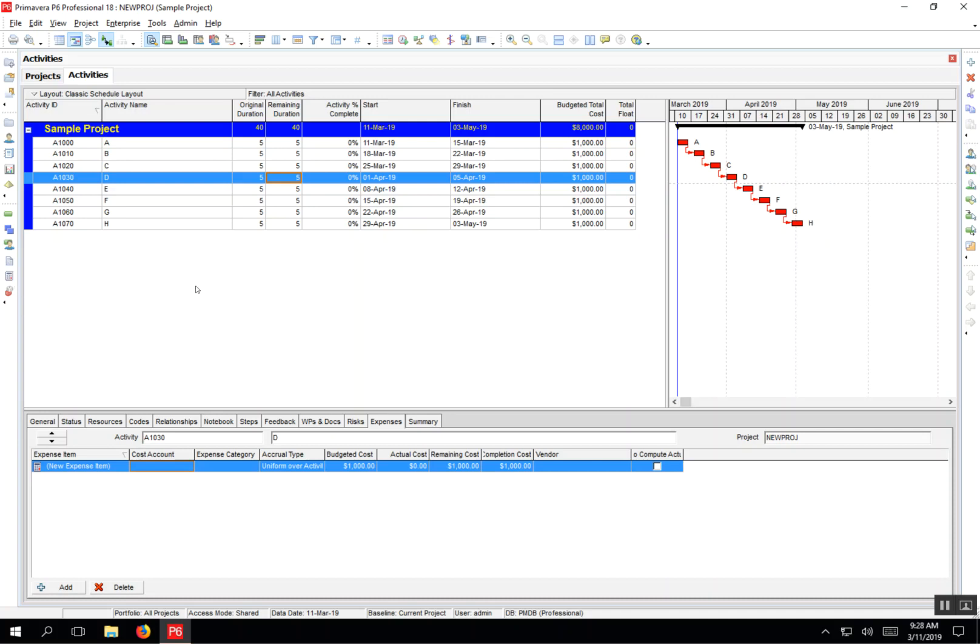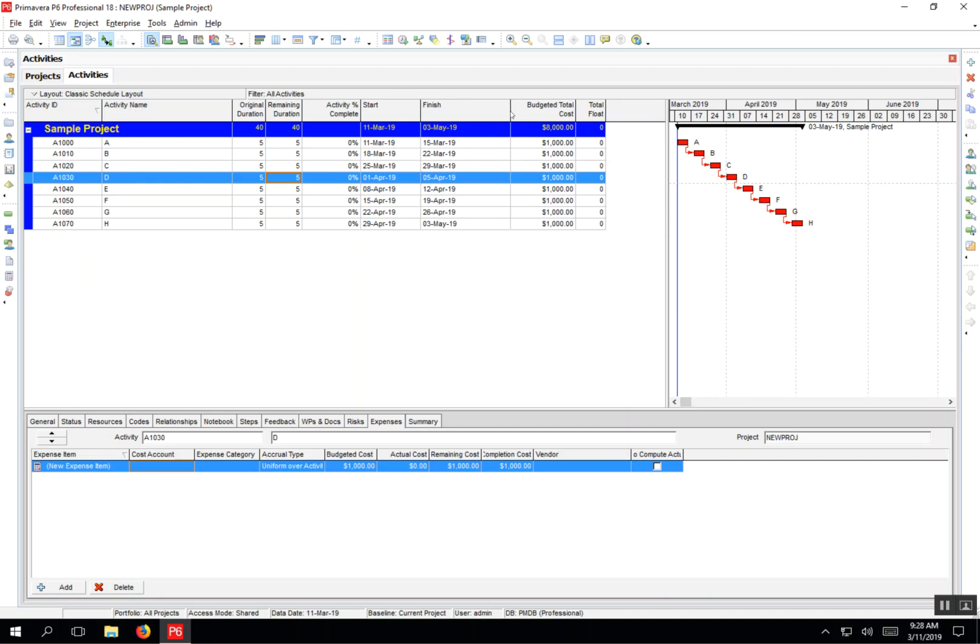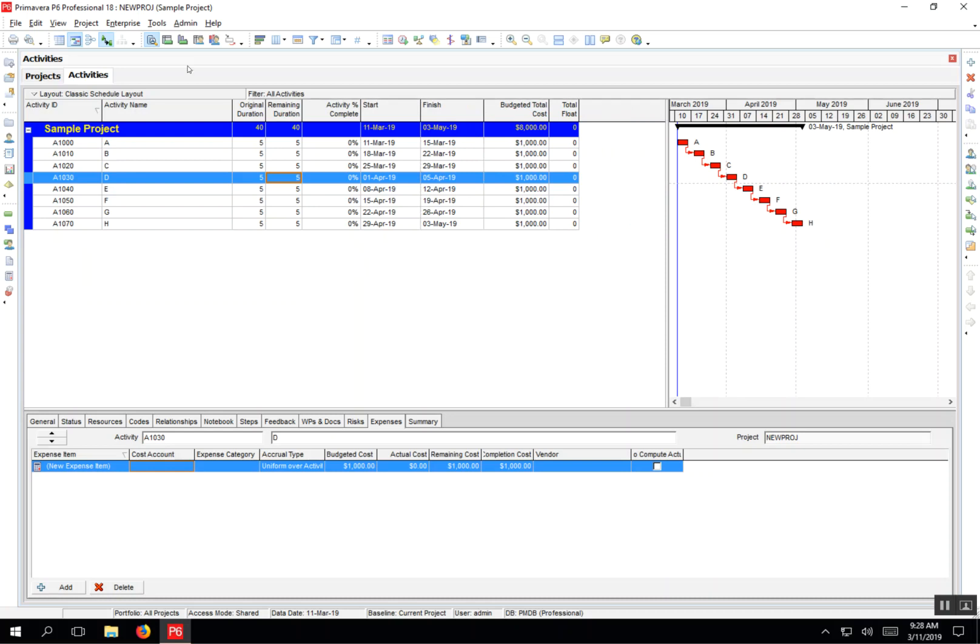We're going to use user-defined fields in a global change to add a 10% contingency to all these activities. First, I'm going to add a column, a user-defined field in that column for contingency.